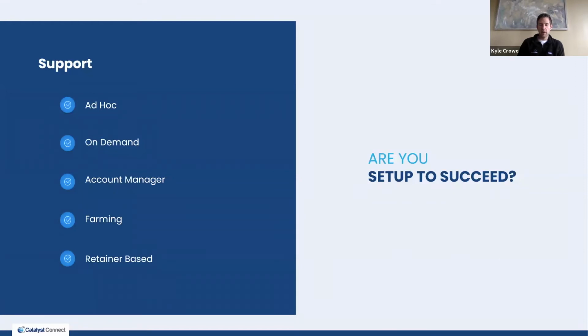That'll give us an understanding of how much resources we have to dedicate to the project on my implementation team. And then that helps us understand how much leftover time we may have for certain developers or certain consultants to work on support. So we have a good understanding of how much support will come in on any given week. It can vary between what clients have issues or need help. But let's say on average we have 50 hours a week of support. We can try to find that 50 hours amongst our implementation team to best support our existing client base that are live on Zoho and have some existing support needs on any given basis.